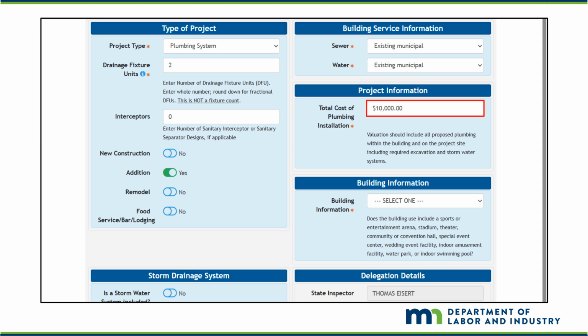The cost of the plumbing installation must include all expenses associated with the construction and setup of potable water systems, building supply and distribution pipes, plumbing fixtures, drainage and vent piping, and all sanitary and storm building drains and sewers within the property boundaries. This cost reflects both material costs, pipes, fittings, fixtures, and valves, labor charges for installation and testing, and any other required equipment usage needed to complete the work in compliance with the Minnesota Plumbing Code.